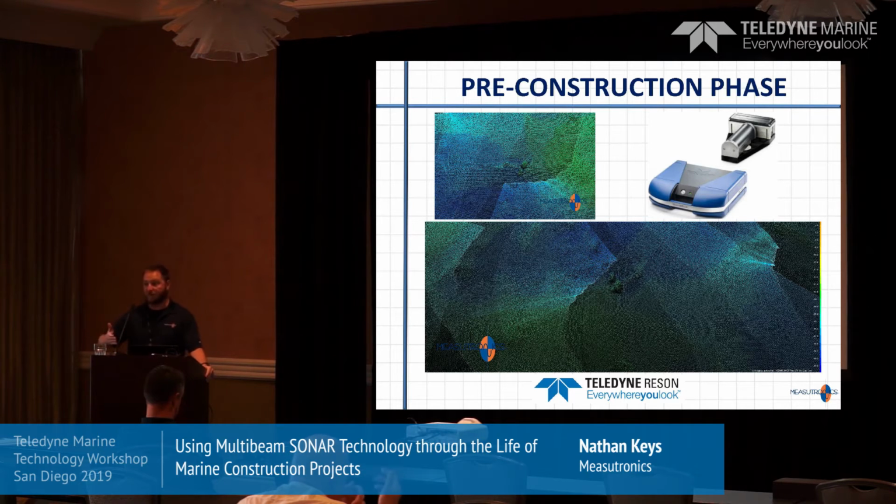Do you want us to remove it? And this is what it would cost to remove it, right? So otherwise, once they start cleaning up, they run into this anchor afterwards. There's no way to prove that they didn't put it there, right? So at this point, they're able to charge for their work. Otherwise, they would have had to just kind of do it on their own nickel. So having this pre-survey before they started allowed them to find these things, make a little extra money.